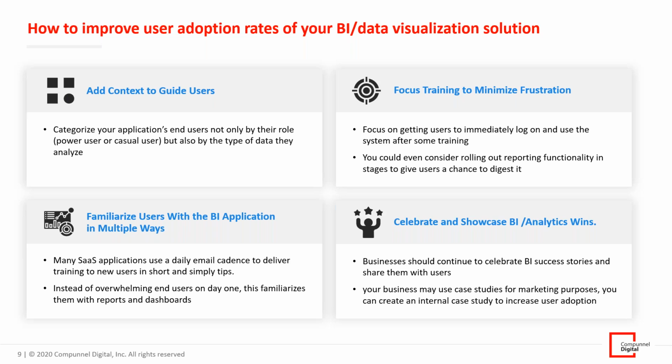when we start the BI implementation, how to begin? Instead of going in a rush for the entire organization, identify the LOB, line of business, or the department which will benefit the most from it, so we can start with that, so that we can measure the benefits and ROI, and the users can come and use the solution. In that way we can think.